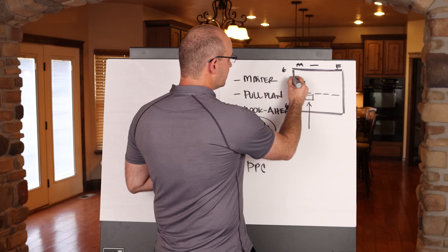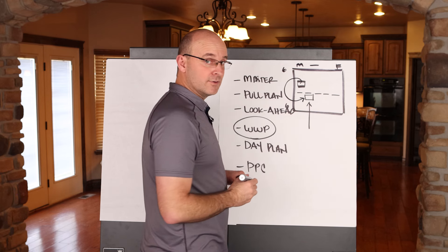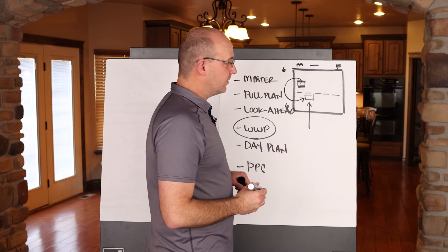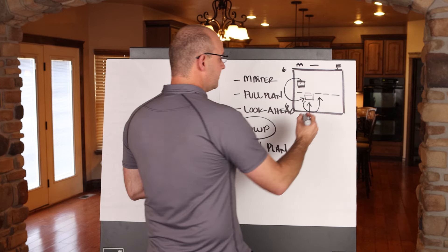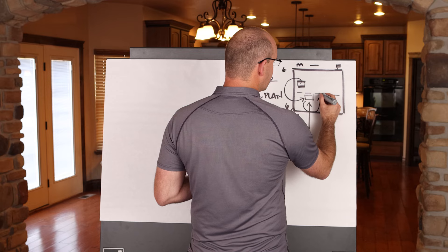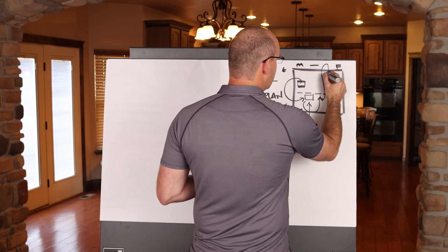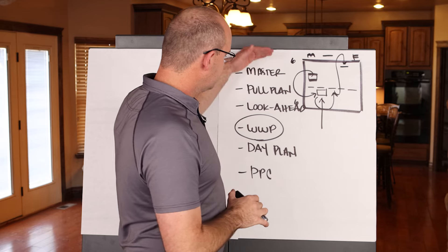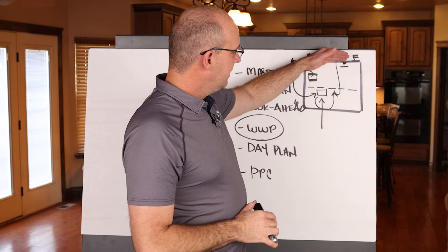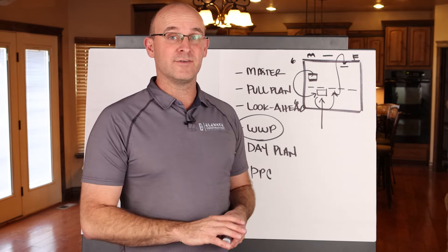And then your day plan and the tracking of your percent plan complete happens when you do your daily huddle. I do them in the afternoons. So when you look at your master schedule, that enables you to then do your pull plans, your look ahead planning, your weekly work planning, which then allows you to do your day planning and execute your work. And then if you do the huddles in the afternoon, like I'm telling you to, then you can go ahead and review that plan with the workers the next day.